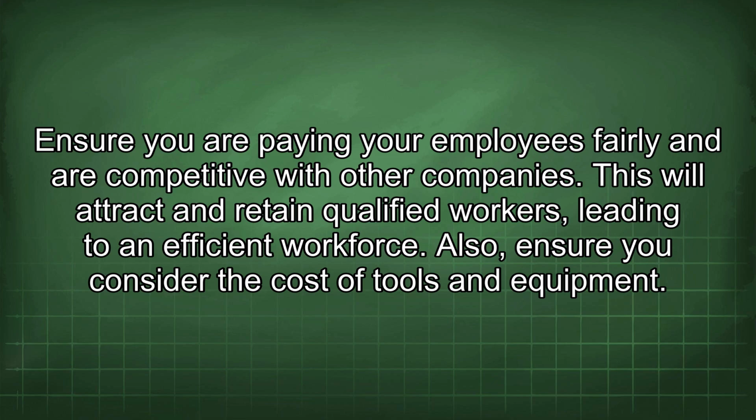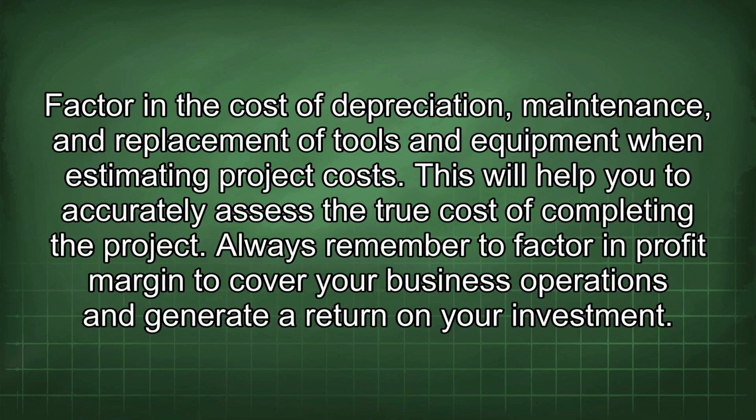This will attract and retain qualified workers, leading to an efficient workforce. Also, ensure you consider the cost of tools and equipment. Factor in the cost of depreciation, maintenance, and replacement of tools and equipment when estimating project costs. This will help you to accurately assess the true cost of completing the project.